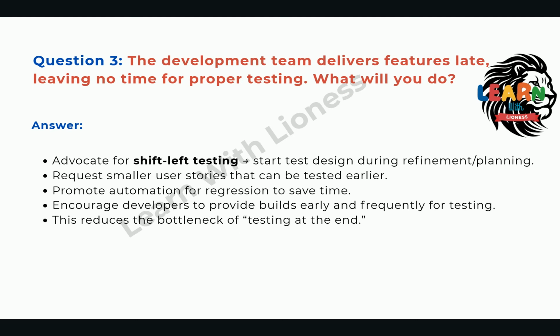Question 3. The development team delivers features late, leaving no time for proper testing. What will you do? Answer. Advocate for shift-left testing: start test design during refinement or planning. Request smaller user stories that can be tested earlier.